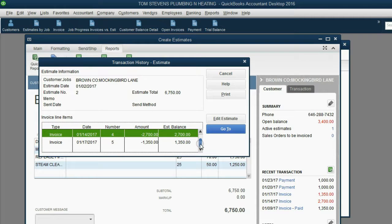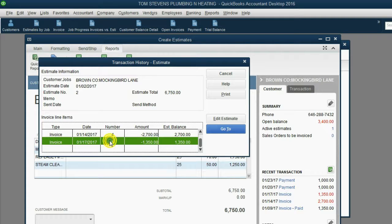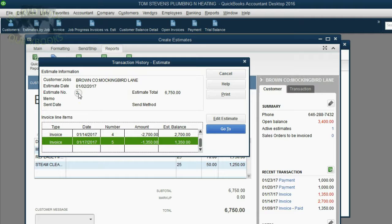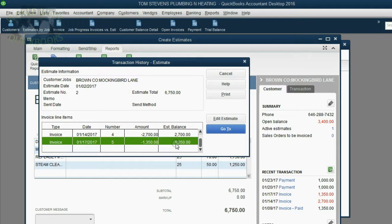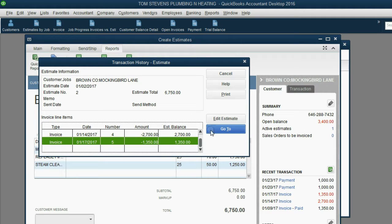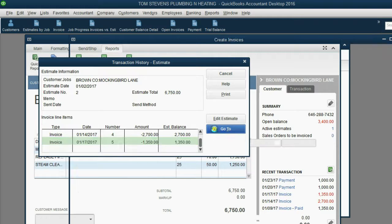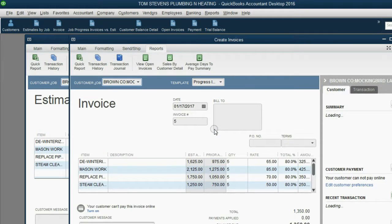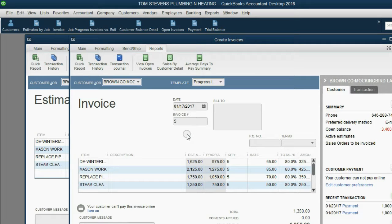And when we come down here, we see that on January 17, we sent them invoice number 5 against this particular estimate. And now, the unbilled balance of this estimate is $1,350. We can always click the Go To button, and we will go to whatever invoice is selected. And this is the invoice we made on January 17.